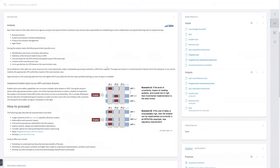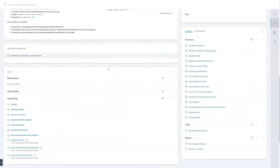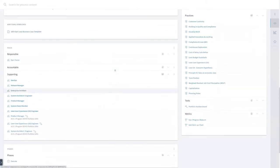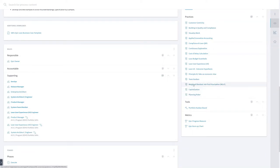And as you know, Analyze Epic is also talking a lot about prioritization, and there are different means of how you want to do prioritization. So we see here some practices which you could use. You could use planning poker, you could use cost of delay over the shortest job first prioritization.